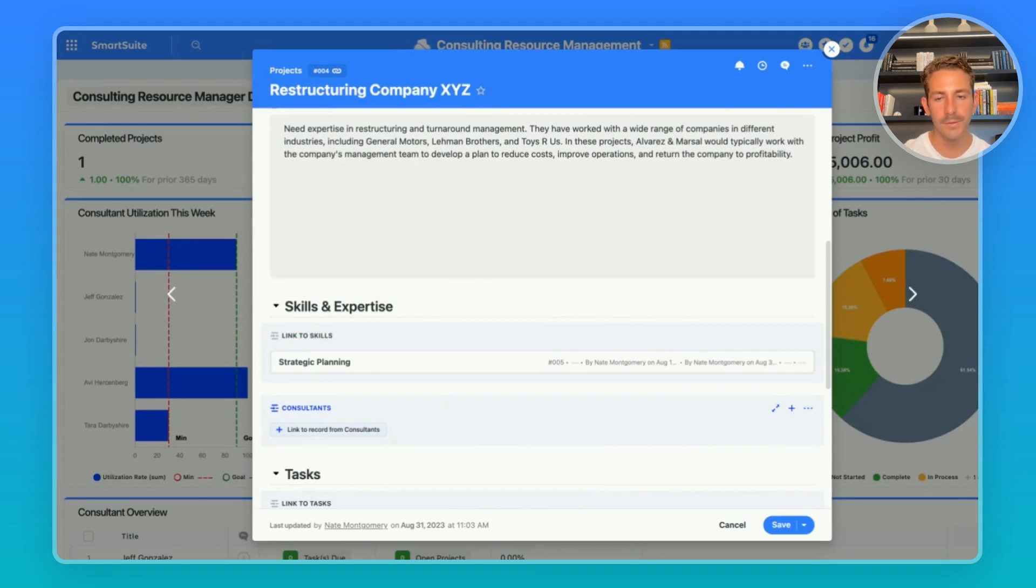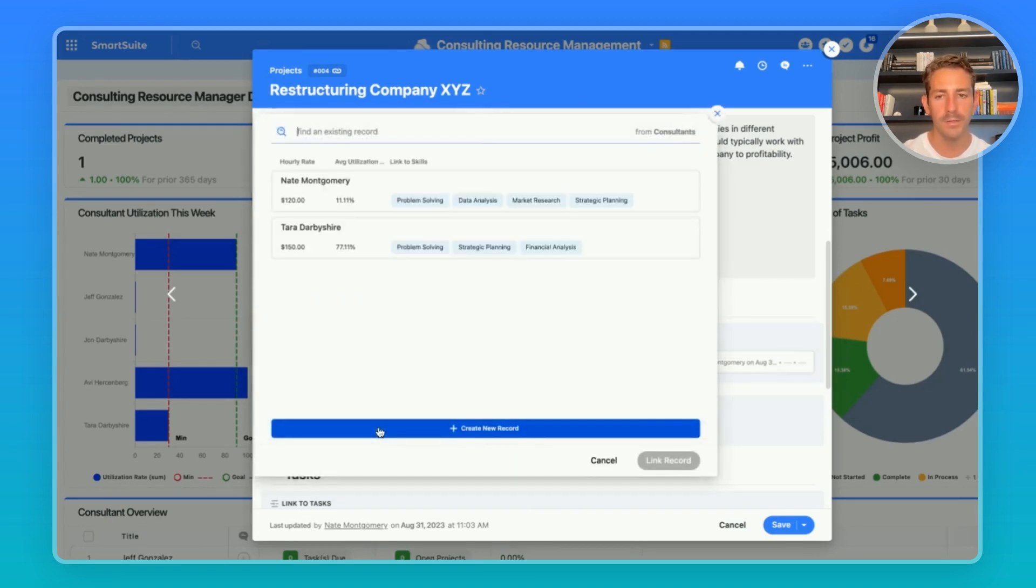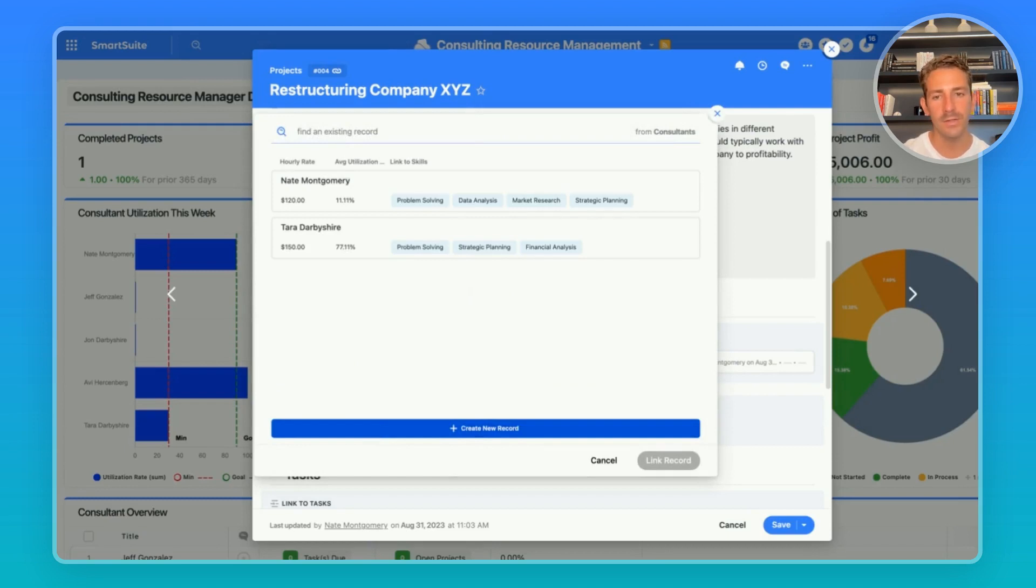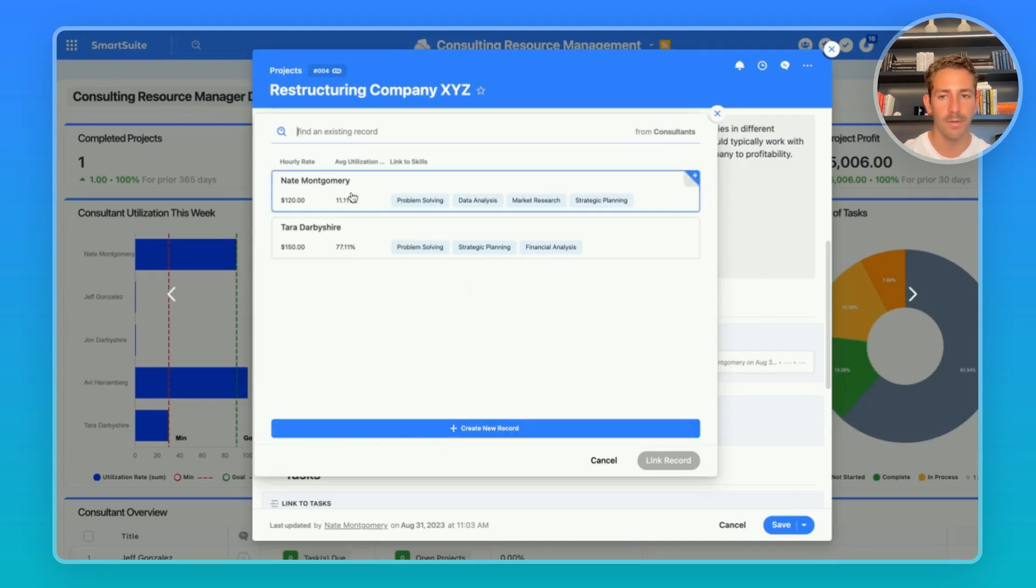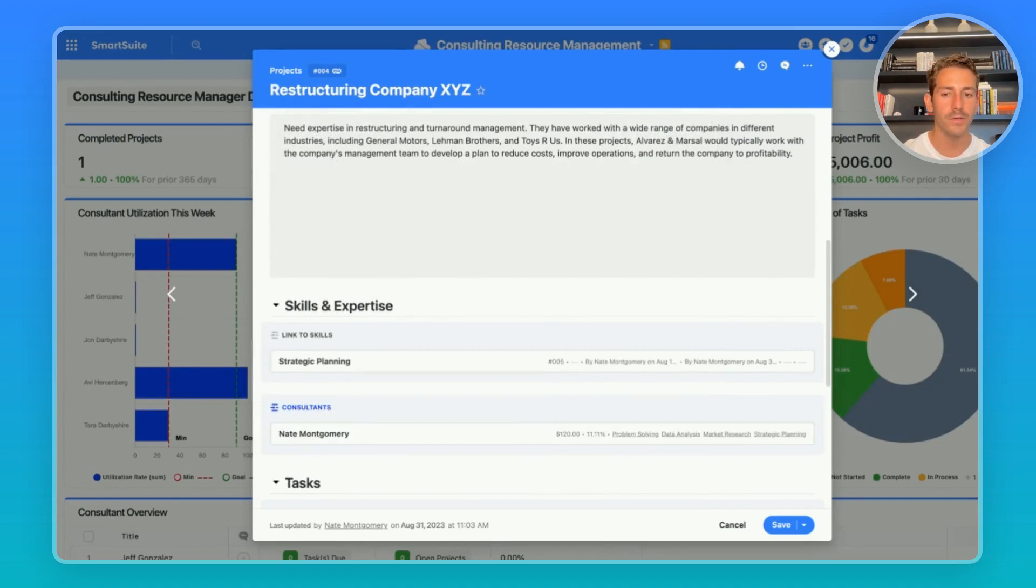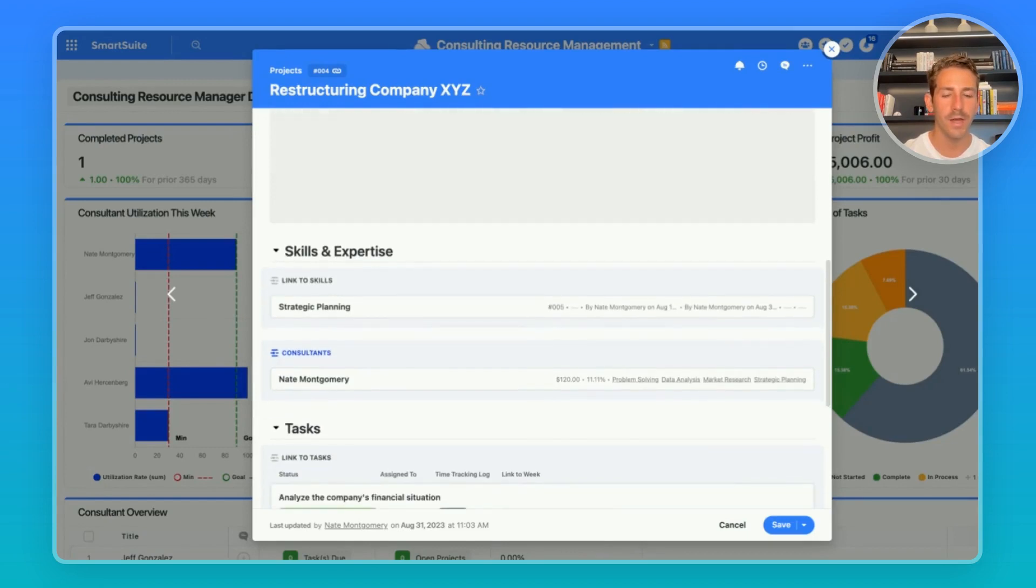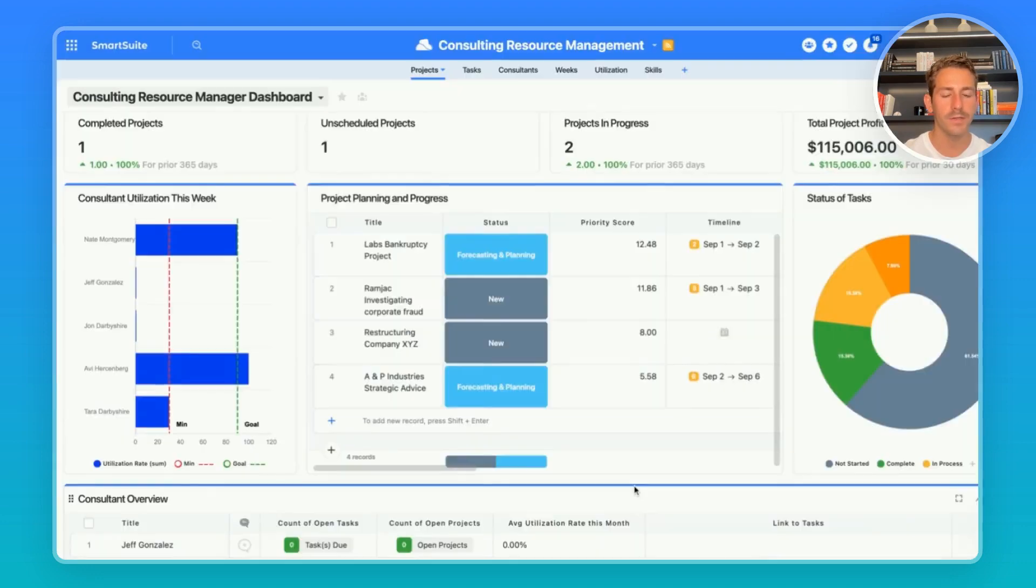And using a pretty fun feature from SmartSuite, when we look into our available resource pool, we're able to dynamically filter our consultants based on who has the skill set we selected prior. It's also going to sort through our resources available and show the ones that are being least utilized at the top as well as show their hourly rate. From here, we can go ahead and assign the project to a consultant to take on and start assigning the tasks of that project to our consultants as well.